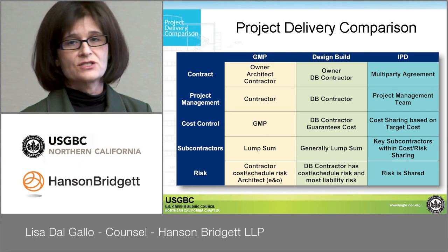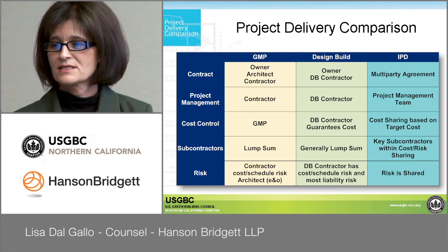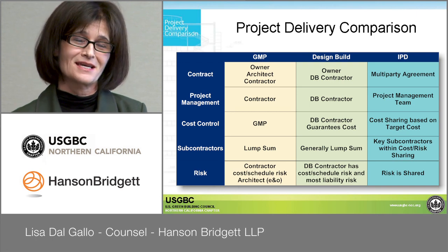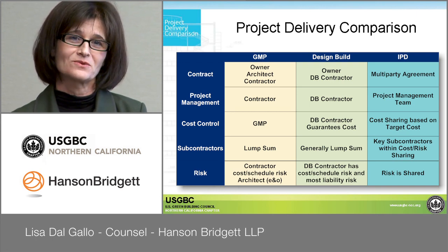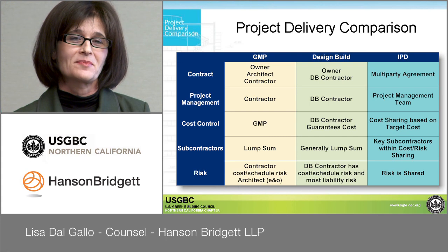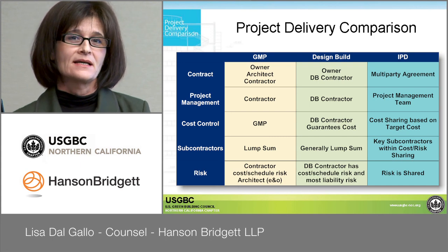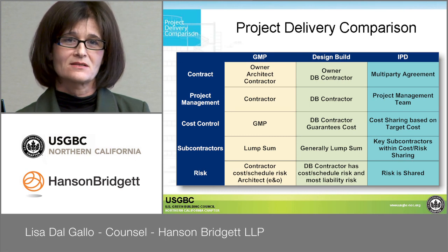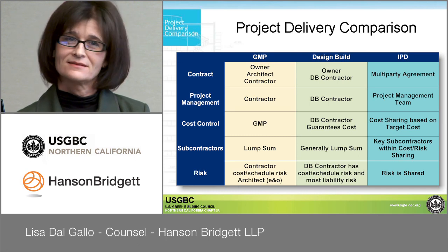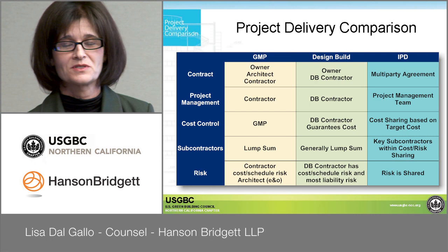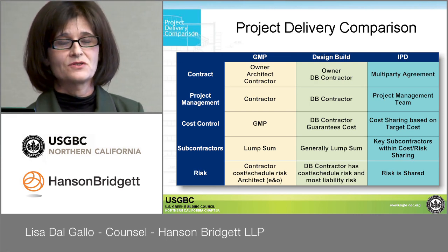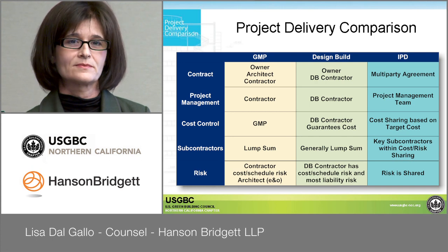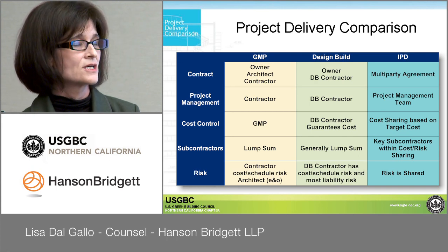And on the risk allocation, the design builder has all the risk for the costs and the schedule and the errors and omissions in this case, because they've subcontracted the work to the architect. Now they're going to pass those costs through, but from an owner's perspective, that is the one nice thing about design build: the buck stops there. You can just say, not my problem, it's all on you, design builder, and you don't have to determine whether it was really a design issue or a construction issue. So it's one advantage.